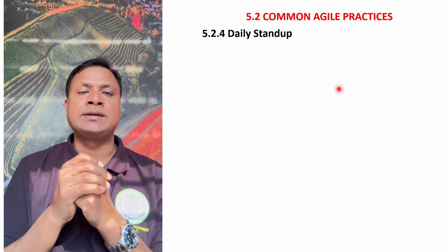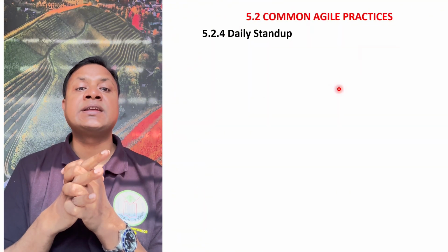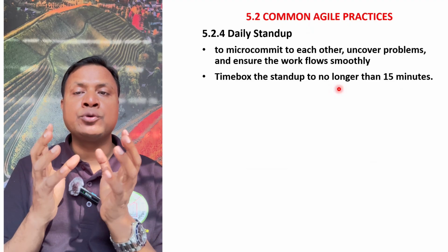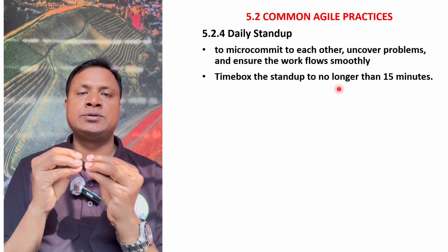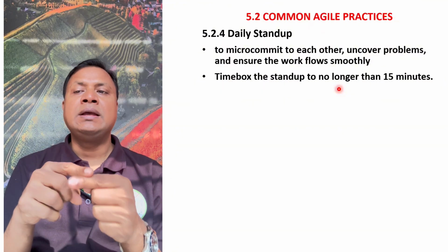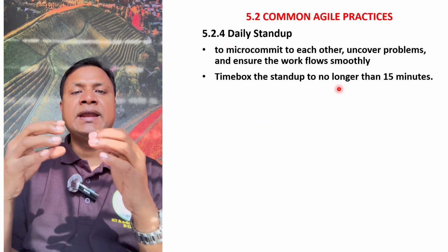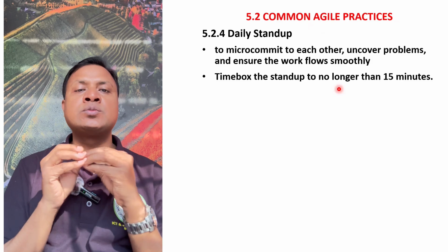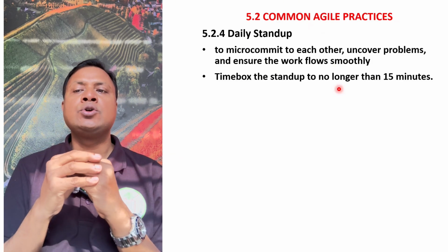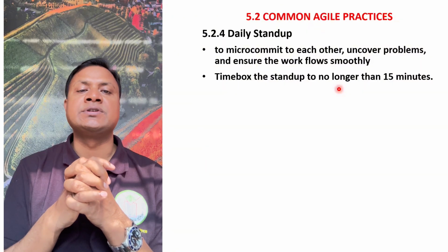And now the daily stand-up. This is an approach to micro-commit to each other. Everyone comes to a decision meeting, they micro-commit to each other, they uncover their problems, and they ensure the work flows smoothly. Time-box the stand-up to no longer than 15 minutes.